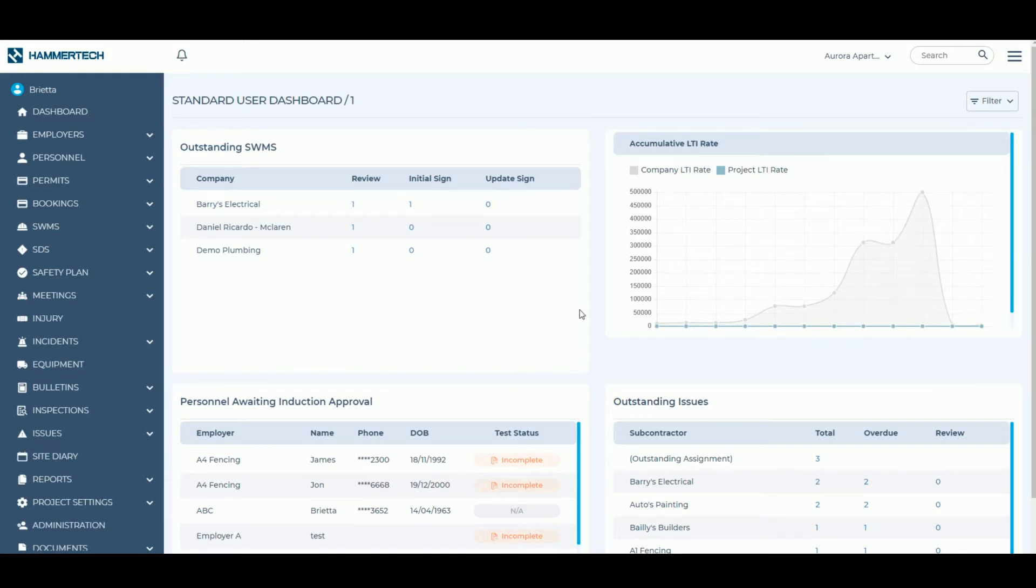Both subcontractors and head contractors can induct plant when it arrives on site. If subcontractors are inducting plant, an authorized person from the head contractor like the site manager will be required to approve the piece of plant.